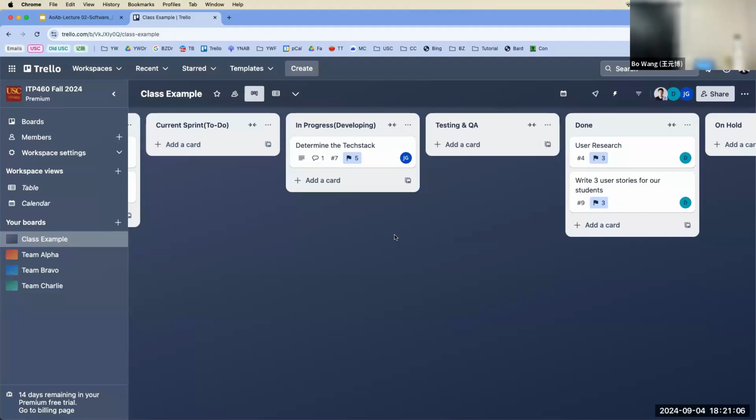It's okay to break it down and assign points to each, and tell us this is actually a 13-point task, not a 5-point task: front end is 5, back end is 8. That's fine, and move along with finalizing what you can finalize. That happens, not always, but it happens. The better you estimate from the beginning, the better you get it all done. But things always happen. This is the full sprint process at a glance.